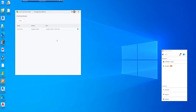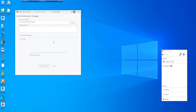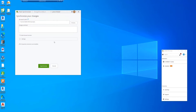Here's the iTwin synchronization process. This takes whatever DGN file you choose — or other formats like Revit, and other connections — and allows you to automatically synchronize that model. It'll validate your connection, and once it's done checking, it'll let you synchronize. The importance here is it will also allow you to do change set management between submittals — like a 30%, 60%, 90% submittal. One of the big benefits of the iModel process on the iTwin platform and the iModel.js libraries is that they manage change between one submittal and another.